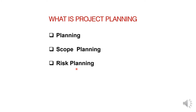Risk planning is the thought given for more precise planning — for the work to be completed in time, one must also think about the risk, i.e., what can go wrong during the project work. For example, if the construction is unable to obtain material resources in time due to transportation problems, the project manager or contractor must find alternative means to make resources available so that work does not get affected and we can avoid delay of activities.